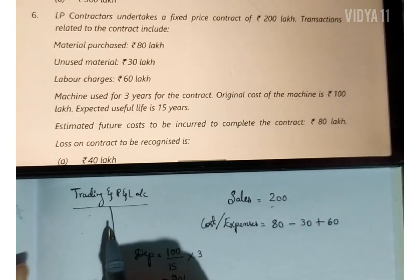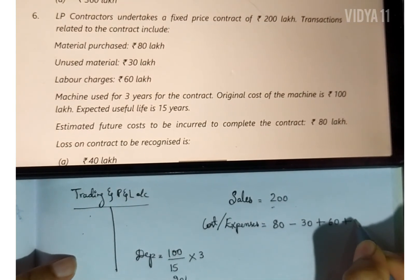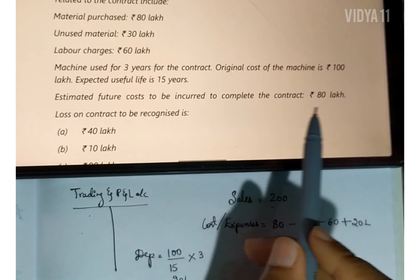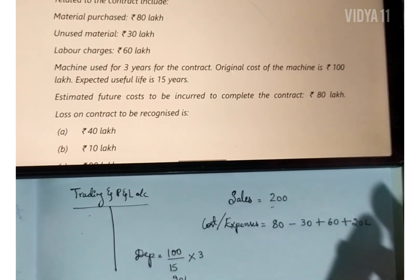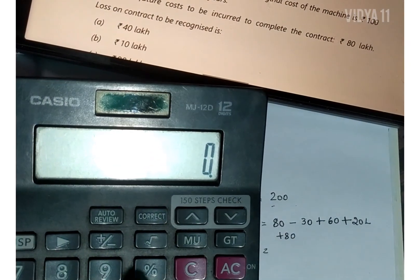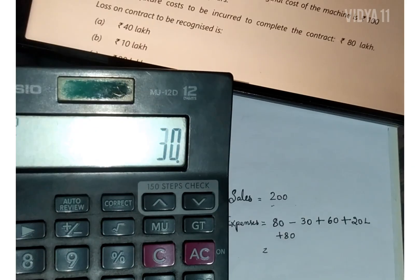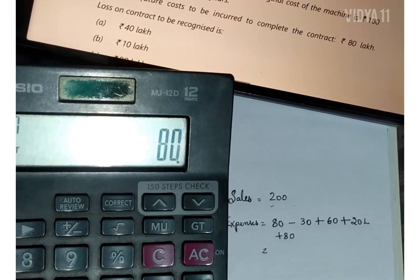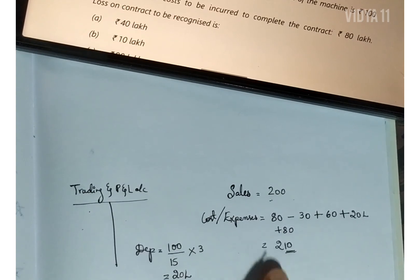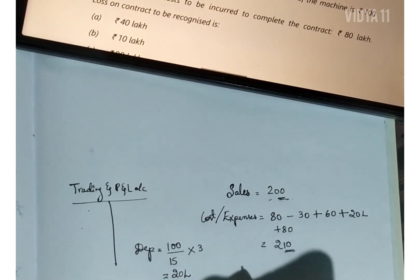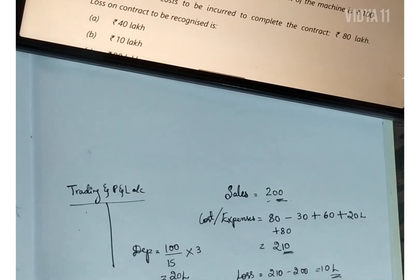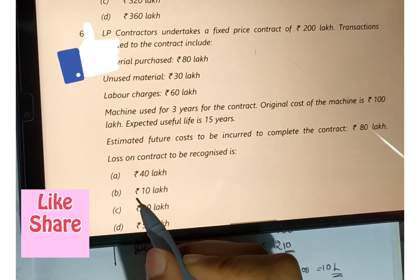Depreciation expense on the debit side is 20 lakh. Estimated future cost to complete the contract is 80 lakh. Total cost = 80 − 30 + 60 + 20 + 80 = 210 lakh. We incur 210 lakh but receive only 200 lakh on the fixed price contract, so the loss is 210 − 200 = 10 lakh — option B.